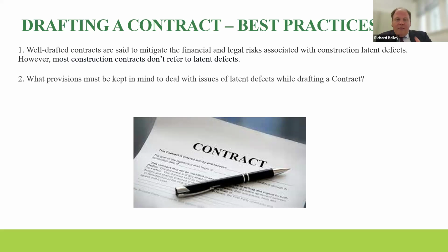And actually, one other thing I will mention, and this is only because it came across my desk once and now I do draft it: even if you're in a contract where the limitation period is 6 years, there is an argument to say that you can still say it's a 12-year liability period by contract. So you can actually draft in, if there are particular issues and it's underhand or you can't organise signature by deed for whatever reason, expressly stating what the limitation period is going to be. This is sometimes quite useful. So that's a few comments from me.